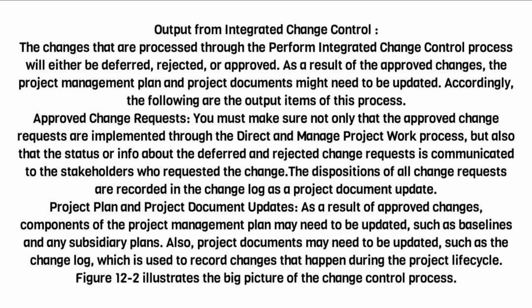Approved change requests. You must make sure not only that the approved change requests are implemented through the direct and manage project work process, but also that the status or info about the deferred and rejected change requests is communicated to the stakeholders who requested the change. The dispositions of all change requests are recorded in the change log as a project document update.